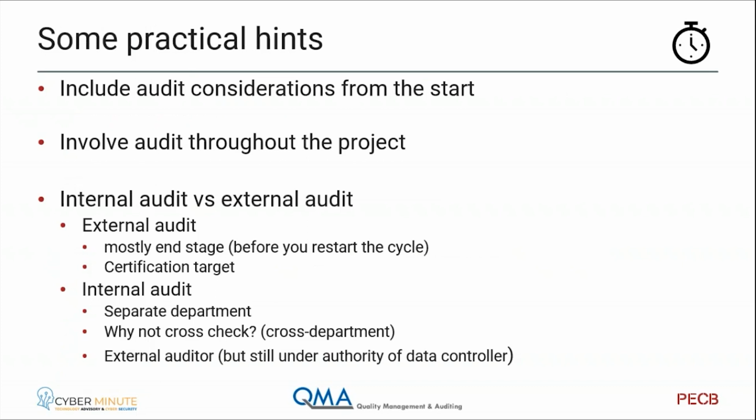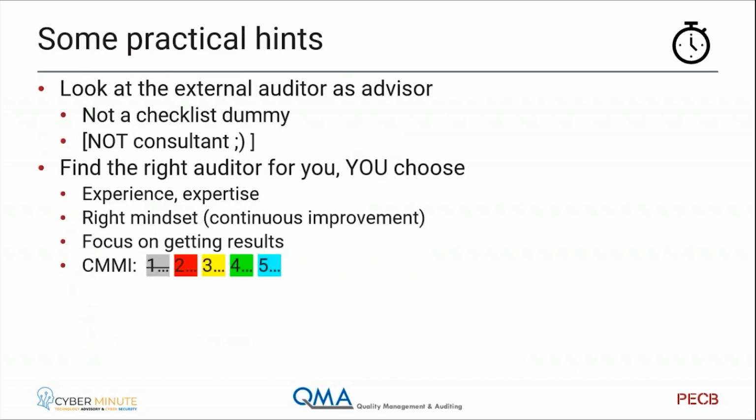One important key point we also discussed previously is that you think about audit from the beginning. Don't think about audit at the end of the implementation project. It will help you a lot to make proof and make sure that you actually have everything in the system. Second important remark: make sure you have an internal audit prepared, because the external auditor will look at your internal audit reports, and you must be able to prove that you reacted on the non-conformities of this internal reporting. That's very important also for the external audit.